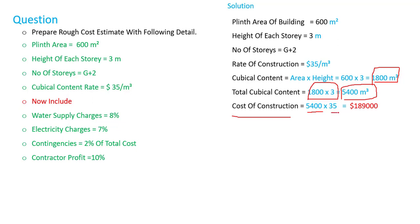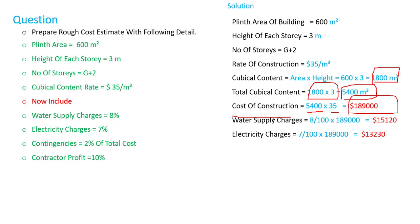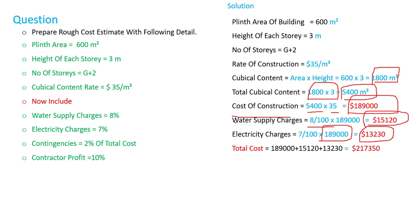That is 5400 multiplied by the unit rate of $35, giving us a total cost of $189,000. Next, we add water supply charges at 8%: 8 divided by 100 multiplied by the cost of construction. Then electricity charges at 7%: 7 divided by 100 multiplied by the total cost of construction, giving us $13,230.